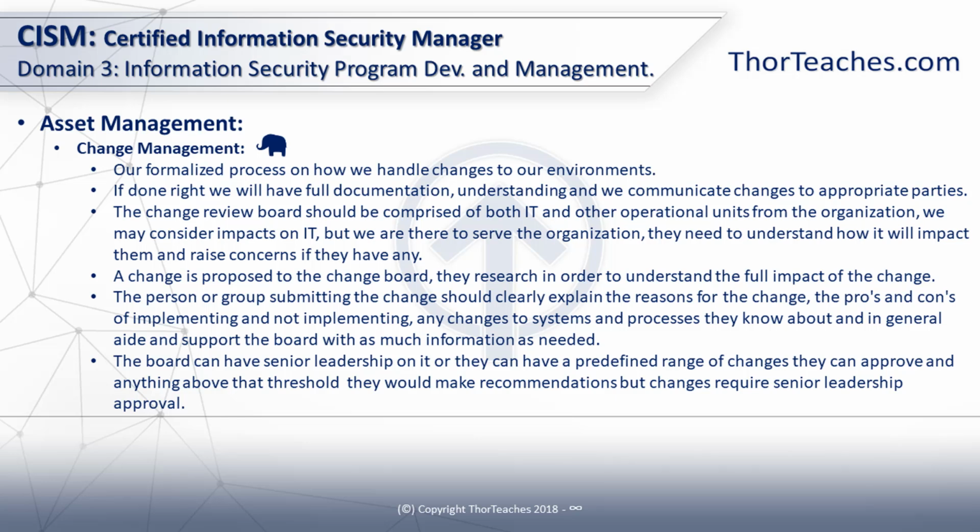And in many places, we would also have sub-boards, meaning the change review board is the overarching board, and then we would have change approval boards, technical approval boards. If, for instance, the server we're updating is a pharmacy server, then we would have people from the pharmacy team on one of the boards as well. This is what we're doing. This is how it's going to impact you. Do you see any issues with that?